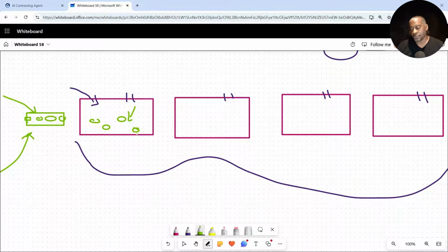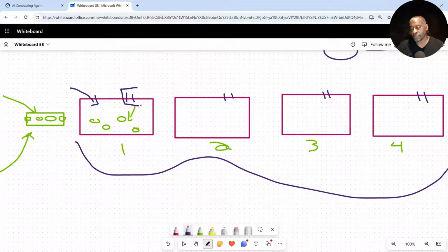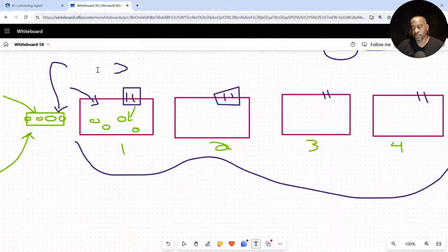From there, we have a series of workshops. So this would be workshop 1, workshop 2, 3, 4, and so on and so forth. Each one of these workshops is driven by a particular topic. Ideally, what we do is get a rough SWAG of the workshops that are needed, and in this kickoff, we highlight that calendar. We highlight, here's the workshop, here's the topic, and this is the date. We try to keep these workshops between 30 to 60 minutes.